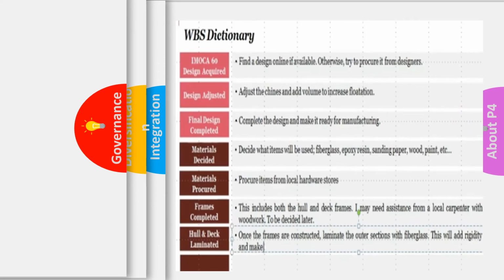Now, when we look at the work breakdown structure, we also need a work breakdown structure dictionary. And a dictionary helps you to classify and clarify exactly what things mean, because sometimes on the work breakdown structure there may not actually be enough detail within that section or element to say exactly what it contains, so as not to misunderstand what that item contains when you think it contains one thing and then it doesn't, which could eventually incur more costs and time to do.